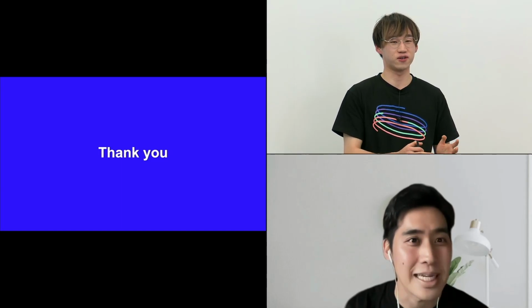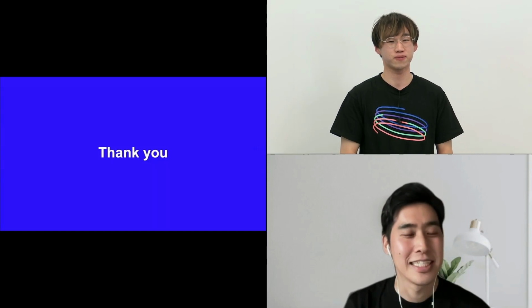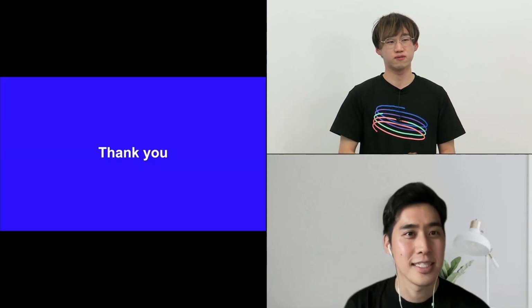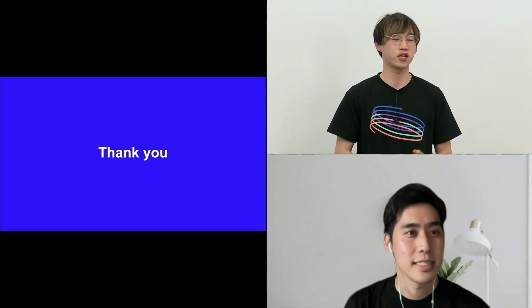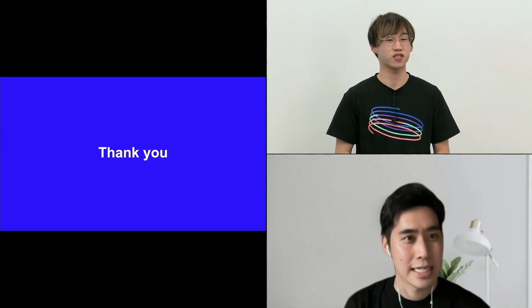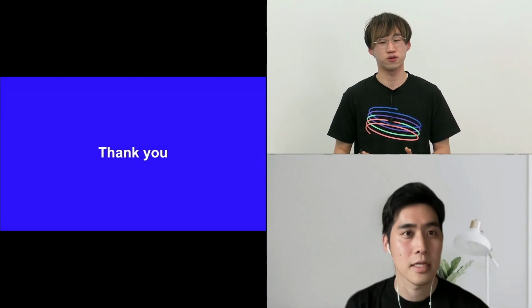So initially, we started with features like the settings menu, features that are not used often, and released them. And if there's no problem, then we go to more complex modules like editing images. That will be more complex, so we have to be very prudent. So we went step by step.